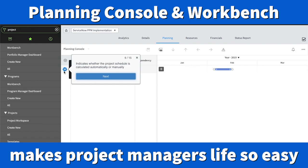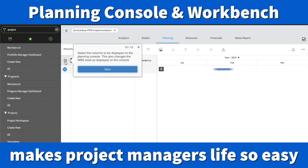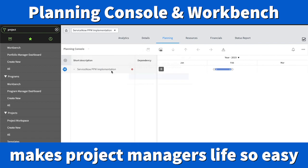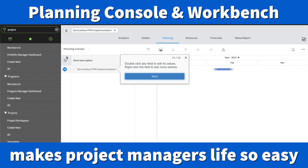The big M in the blue background indicates a project schedule that is calculated automatically or manually. M stands for manual project calculation. The gear icon, or settings icon, lets you select which columns to display. Whatever columns you want to show — you have the years and a number of columns — you can display those using that gear icon.